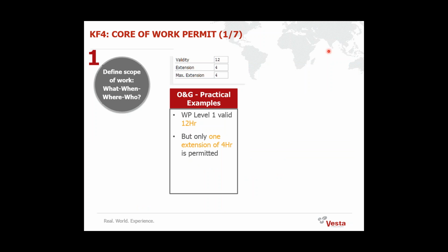So here you have an example. Let's say on level 1 it's valid for 12 hours and we are only allowed to extend it once by 4 hours.